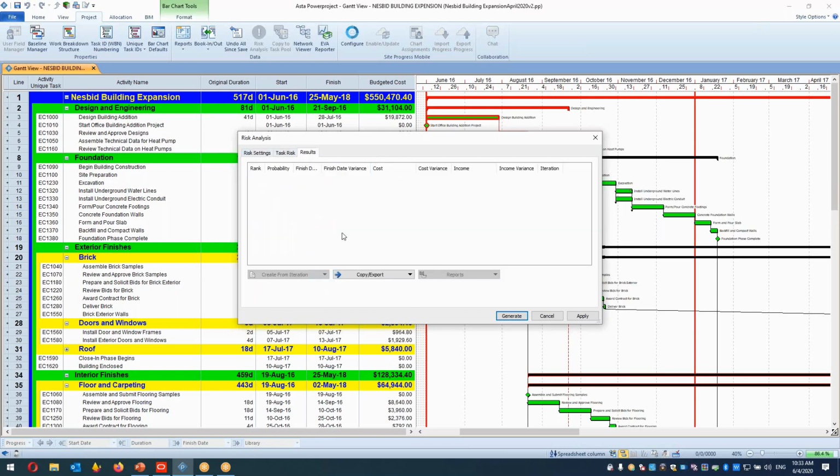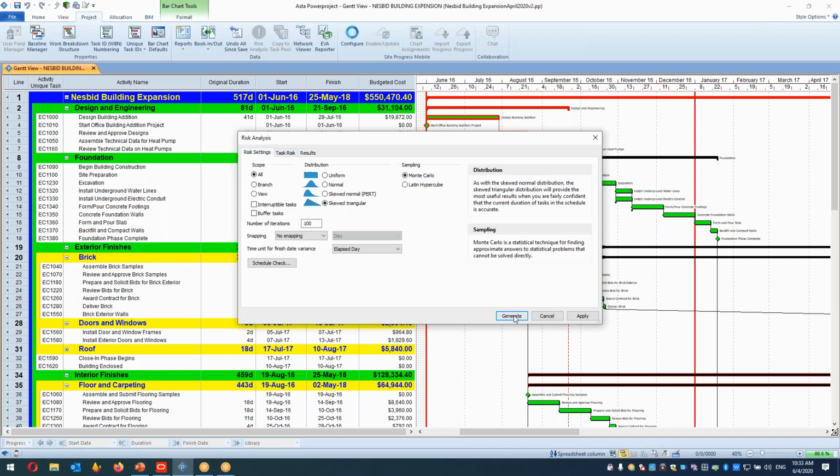So what I am doing now, I have no result here, and I select an option to generate the Monte Carlo simulations. The system is now creating 100 copies, 100 randomly running versions. One time 10 days, another time 9 days, another time 11 days, another time 10, another time 70. So we create randomly 100 versions, but each activity is separate.